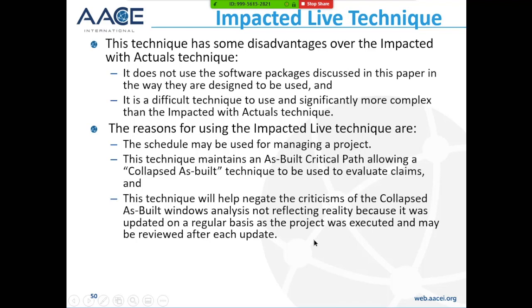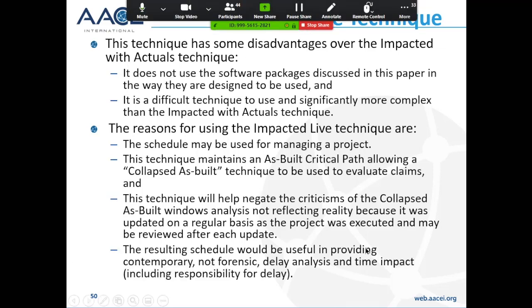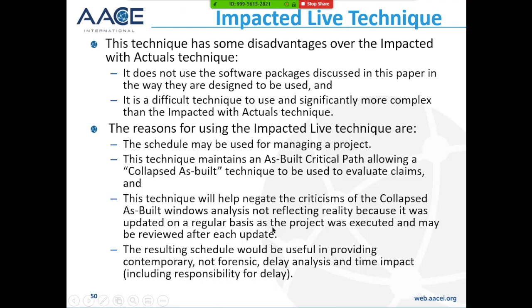And this technique helps negate the criticisms of the collapsed as-built schedule being built later on after the project is finished. The resulting schedule will be useful in providing contemporary and not forensic delay analysis and time impact, including responsibility for the delay.